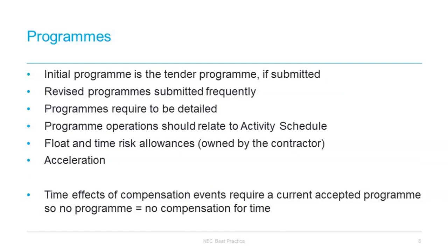You are able to revise your programme whenever you choose to. That does not lead on to a change to the activity schedule unless agreed, but when operating NEC you should definitely get into the habit of updating the programme every time there is a change. You should never try to manipulate your programme, it should just be accurate, including things like when you require access, when you require specific information, and when you require another party to do something. It makes it easier to demonstrate the impact of any compensation events should they arise.